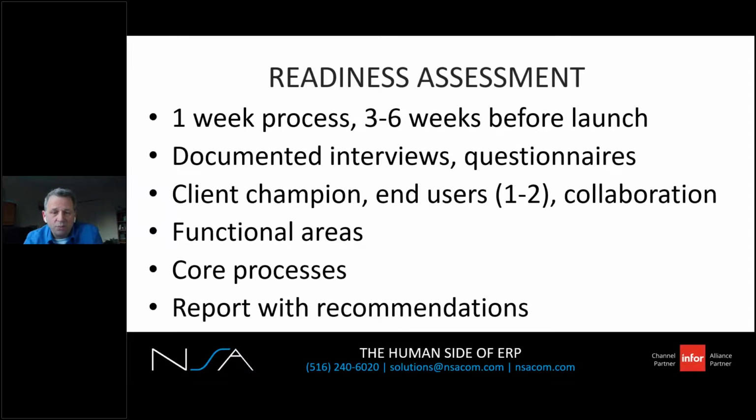The RA follows a predetermined checklist. So you come up with your list of questions for each of these functional areas, and the checklist is shared with the operators in advance. So when they're in this, they've had time to practice, they've had time to read the checklist. So when you're going through it with them, there are no surprises.